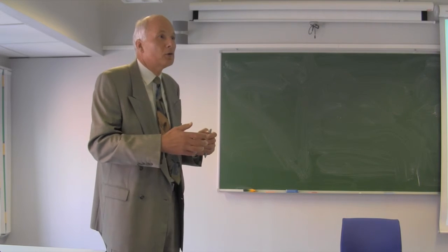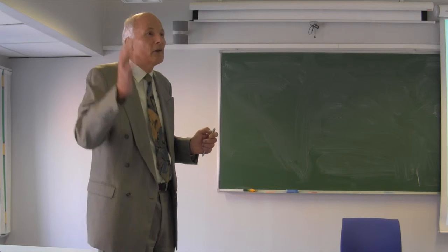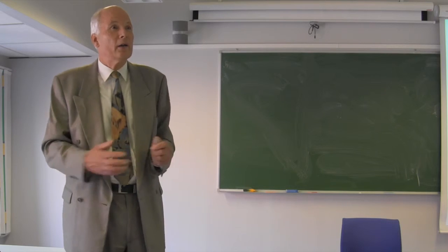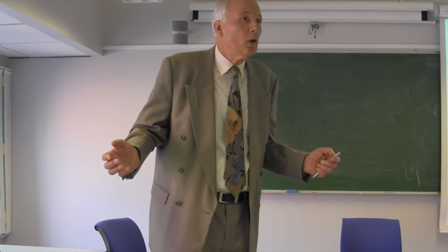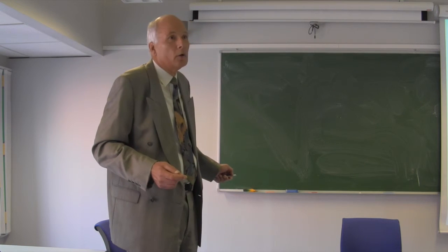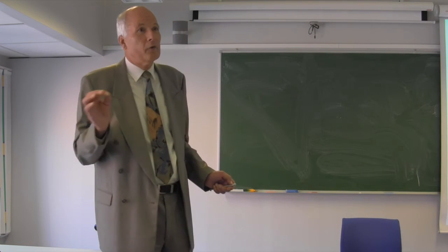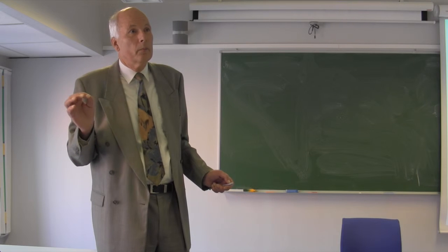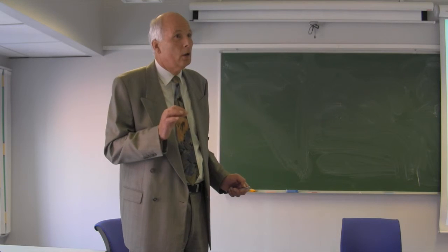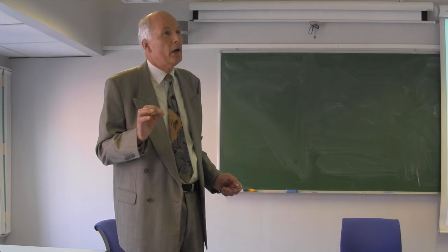Yeah, that's not true. We saw the example. It was a pity, but the geometry was still changed. And so the tool had to be thrown away and the time was lost anyhow. So we have to realize, if you talk about this type of concurrent engineering, you always work with advanced information. It's still not finally released. So there is a risk of change and a risk of losing money and time.